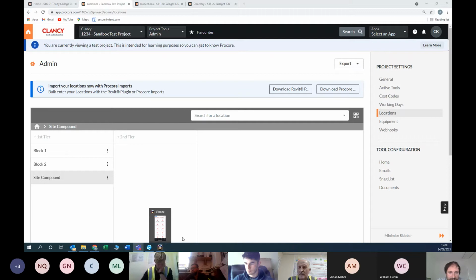Because if you have a very large project, this is a bugbear of mine, you just dump all the photos into the photos tool, just into the project, and you get lost. There are projects with 14 or 15,000 photos. If you're searching for photos, it's a lot easier to understand that it's associated with a room location, and you can find that very easily 6 months down the road, rather than searching through photos one by one. So any of that information is associated with tags or bodies.